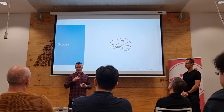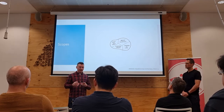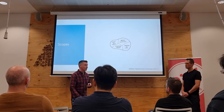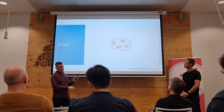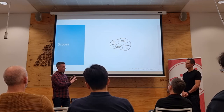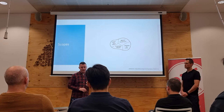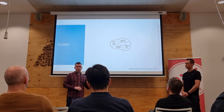Each scope may include front end and back end to form a meaningful layer cake of functionality that can be tested and completed relatively independently of each other and can be moved and done independently. So these are more outcomes or outputs. As mentioned, the scopes are the language of the project.